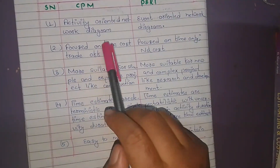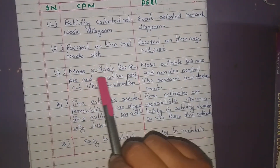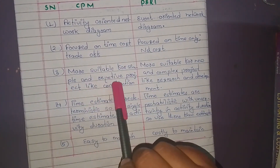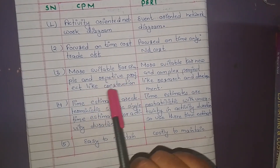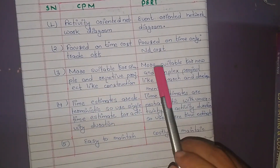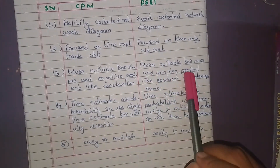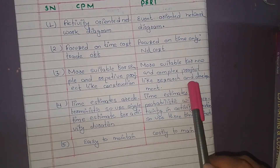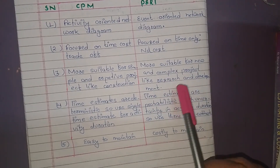CPM is more suitable for Simple and Repetitive Projects like Construction, whereas PERT is more suitable for New and Complex Projects like Research and Development.